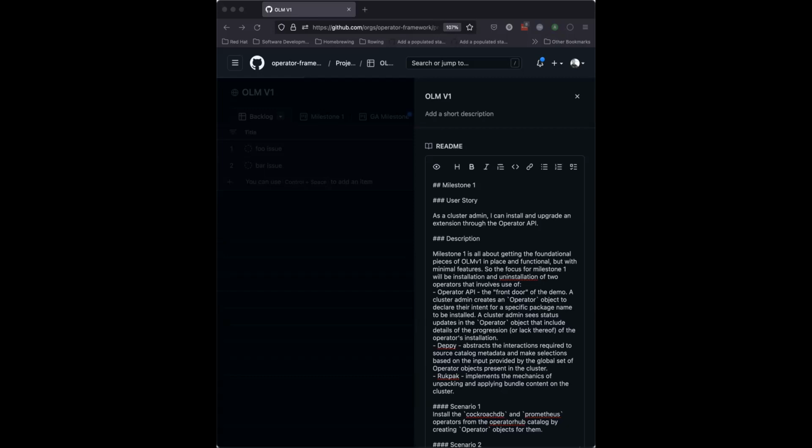So I don't want to work on that until we get to a milestone that says we need to work on that. You know what I mean? If we have stuff in the backlog that's not aligned to our immediate priorities, then that risks those things being worked on out of order potentially.